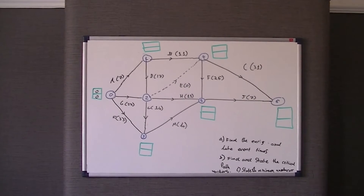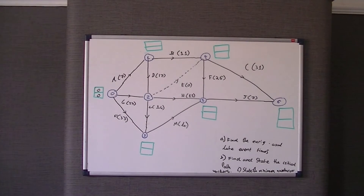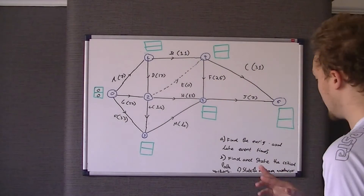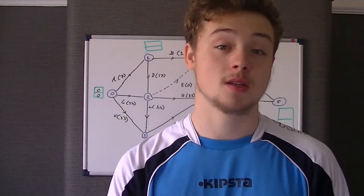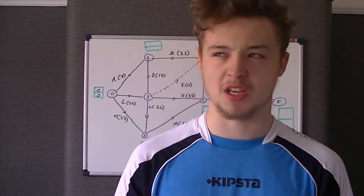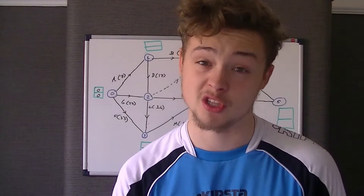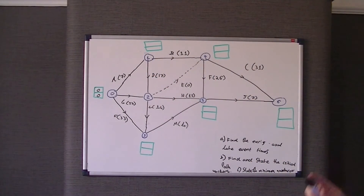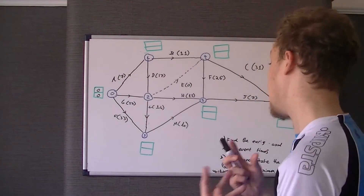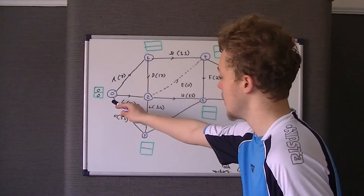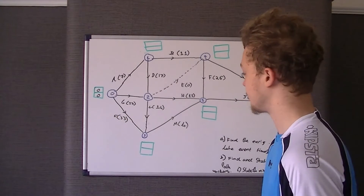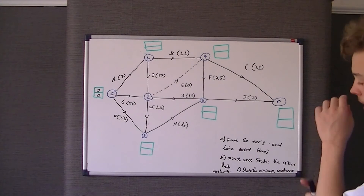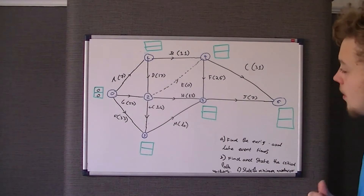Hopefully you've had a go at that. Let's answer it. Part (a) should be relatively straightforward if you understand the context of early and late times. Going from left to right we look at the path with the biggest weighting — the early event time will be the larger value.